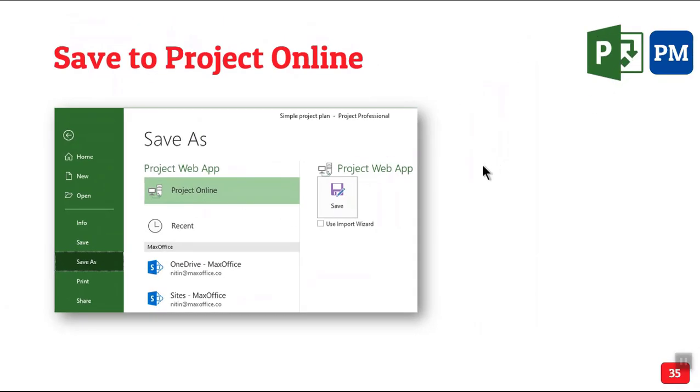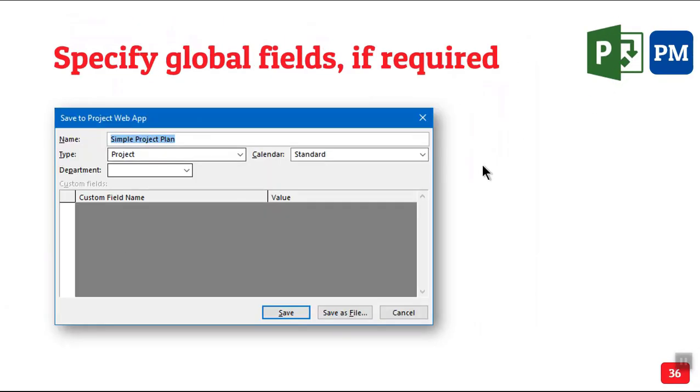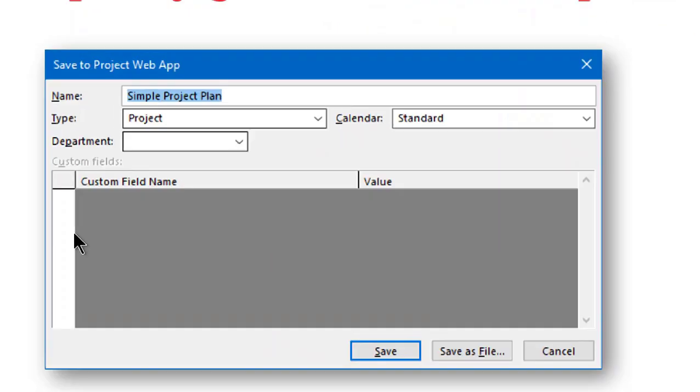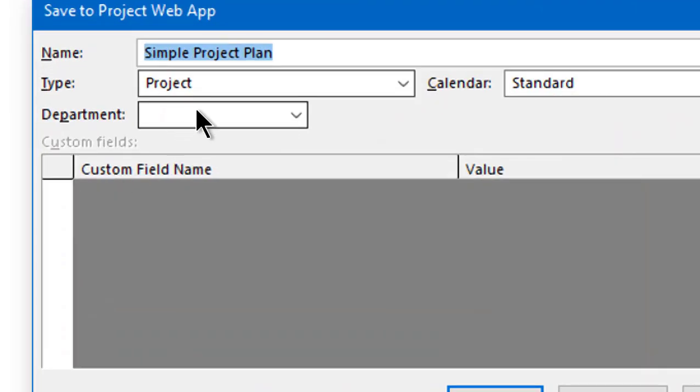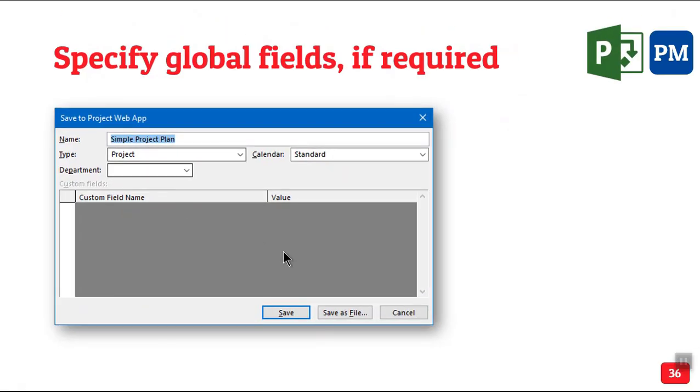Next step, again this is project manager desktop. Now when you do this, we want to consolidate projects across the organization. When we combine projects, the central team, PMO, whatever you call it, they are getting assorted projects. And they are saying which department, which function, which SBU, and they are mapping it manually, again and again every week, every month. So that can be eliminated by creating custom fields here, which can be made mandated. So at the outset itself, the project gets classified. Right now I have only one field called department. You can create any number of such fields.